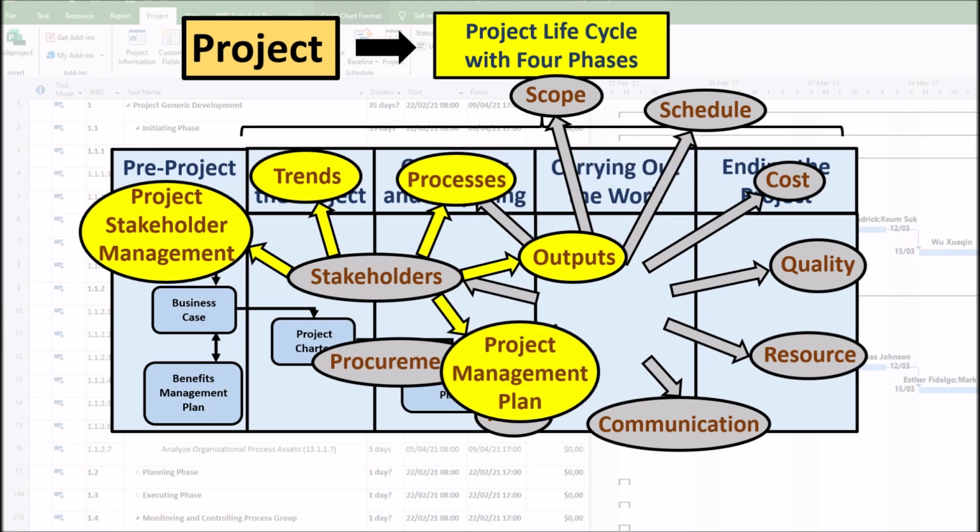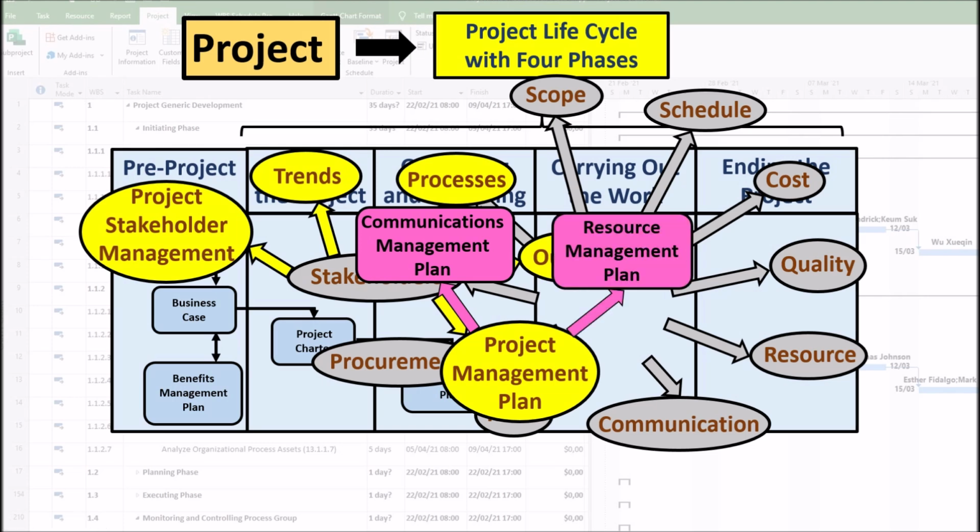Project management plan updates. Components of the project management plan that may require a change request to the project management plan include, but are not limited to, 1. Communications management plan. The Communications Management Plan is updated to reflect new or changed stakeholder requirements or project communication strategies that need to be updated. 2. Resource Management Plan. This plan may include updates to team responsibilities for stakeholder engagement activities. 3. Stakeholder Management Plan. The Stakeholder Management Plan is updated to reflect changes in the stakeholder community, or new or changed management strategies needed to effectively engage stakeholders.